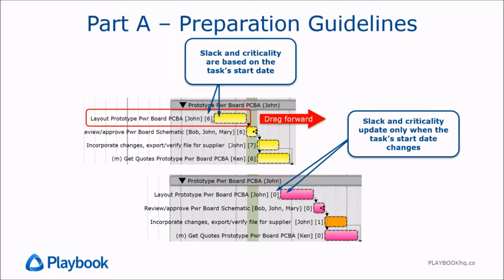And it takes a little more thought than just arbitrarily moving everything day for day, one day forward. If we had Playbook just do that automatically, what would happen is we'd be bulldozing our tasks day for day into the future, creating a bigger pile of work that is unrealistic. The pile grows from 6 hours of work to 10 hours of work to 20 to 50 to 100, and we don't have a realistic timeline. So therefore, we don't have realistic expectations. So therefore, it takes a little more thought.